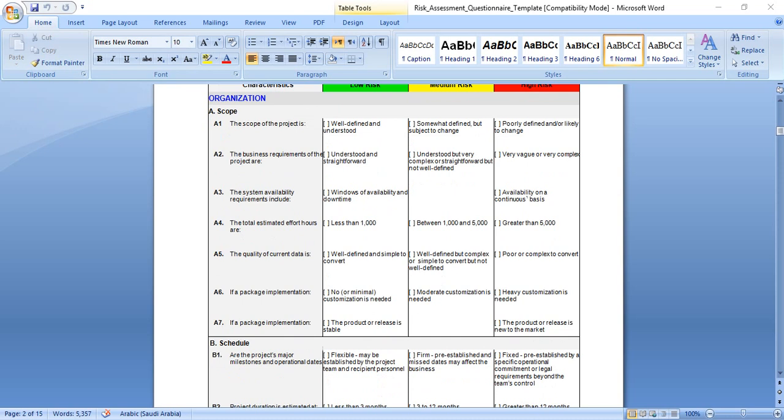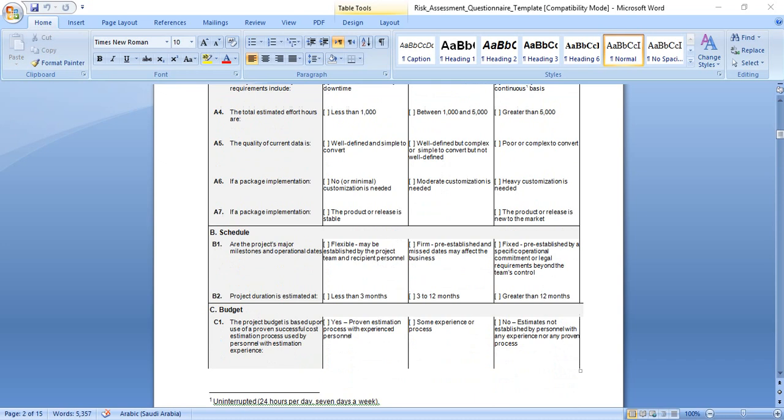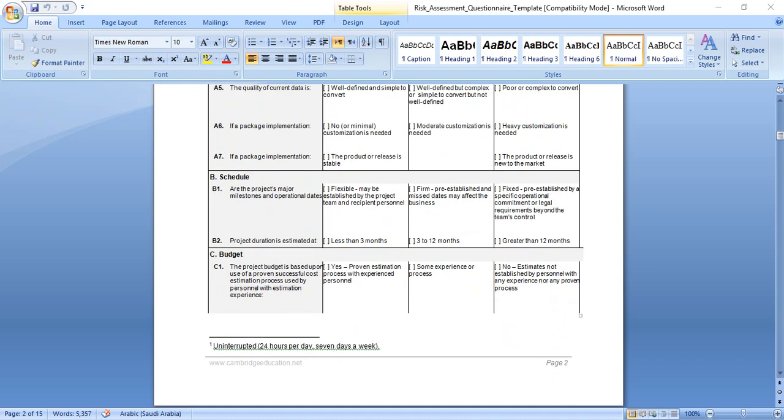The system availability requirements include windows of availability and downtime, this means low risk. Availability on a continuous basis, this means higher risk. The total estimated hours are less than one thousand, low risk. Between one thousand and five thousand, medium. Greater than five thousand, this means higher risk. The quality of current data is well defined and simple to convert, low risk. Well defined but complex, or simple to convert but not well defined, medium risk. Poor or complex to convert, this means higher risk.